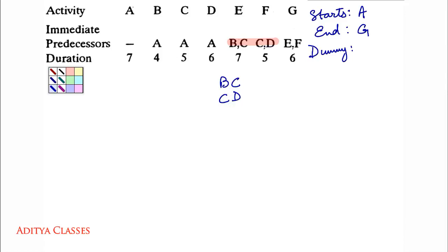So whenever you get this kind of relationship in predecessors, that C is pairing with B and C is pairing with D. In this case, we will need two dummies and both dummies will be for C.